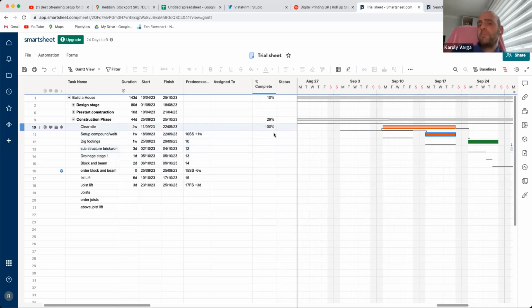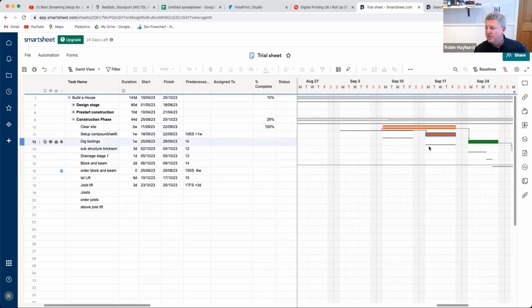And you have to add manually, obviously, what is completed and how many percent, or is it just like you should? Yeah, you have to. Sometimes you can drag it. Occasionally, it'll let you drag it. Not this one. So you have to add it manually in there. You have to decide how far along you are and update it.